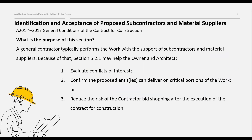So, you may be asking, what is the purpose of this section? In most cases, a general contractor performs the work with the support of subcontractors and principal material suppliers. Because of that, providing a list of persons or entities that will perform the work governed by the contract for construction is important. For example, Section 5.2.1 may help the owner and architect evaluate conflicts of interest with proposed subcontractors and material suppliers. It may also help them confirm the proposed entities can deliver on the critical portions of the work.